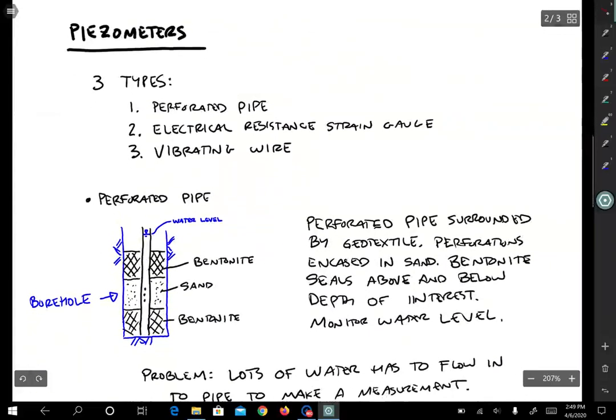All we're doing is waiting for water to leave the clay before we can do that. So if the water happens to leave the clay faster than we initially predicted it would, we can push the project schedule. And as I mentioned, consolidation almost always happens more quickly in the field than we predict. So monitoring it could really allow you to push the schedule.